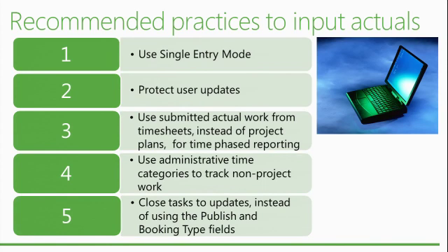So the first one is to try to use single entry mode. The second one is to protect the user updates. We saw that setting to avoid having the project manager or someone else with permissions override the end user updates. Another one is to use the submitted actual work from timesheet instead of the project plan for time phase reporting, which has to do with the way the information flows through the system.